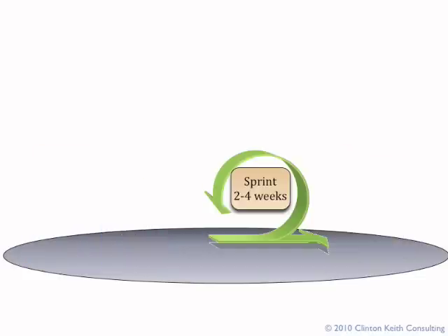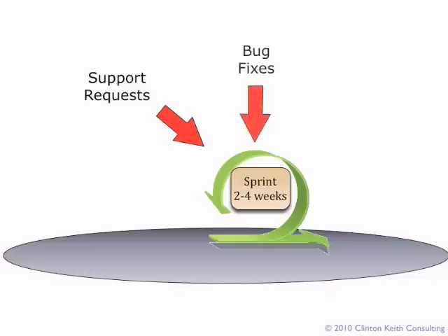Now, the problem that shared service teams often encounter is that they cannot be left alone with an unchanged goal for even 2 weeks. Urgent support requests, severe bugs, or urgent needs from marketing, for example, come along that cannot be postponed. Consider that with a 4-week sprint, such requests can take up to 8 weeks to be fulfilled, which can often be too long. The Scrum benefit of team commitment can be lost under these circumstances.